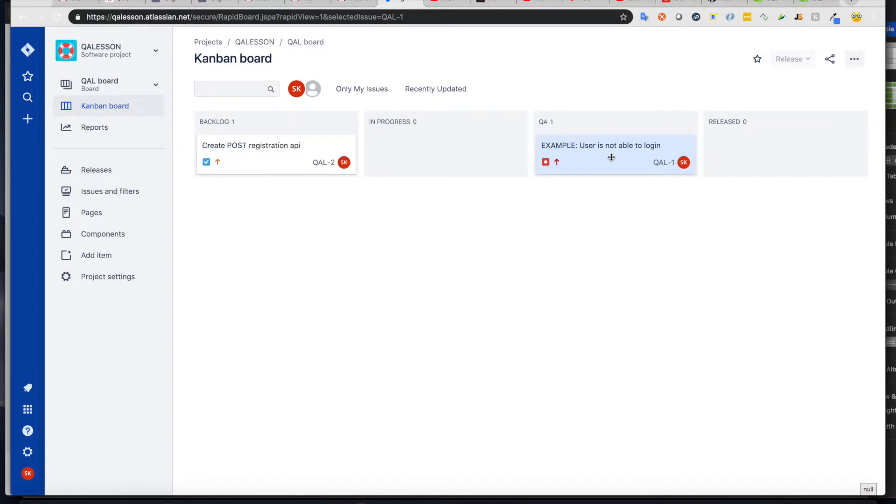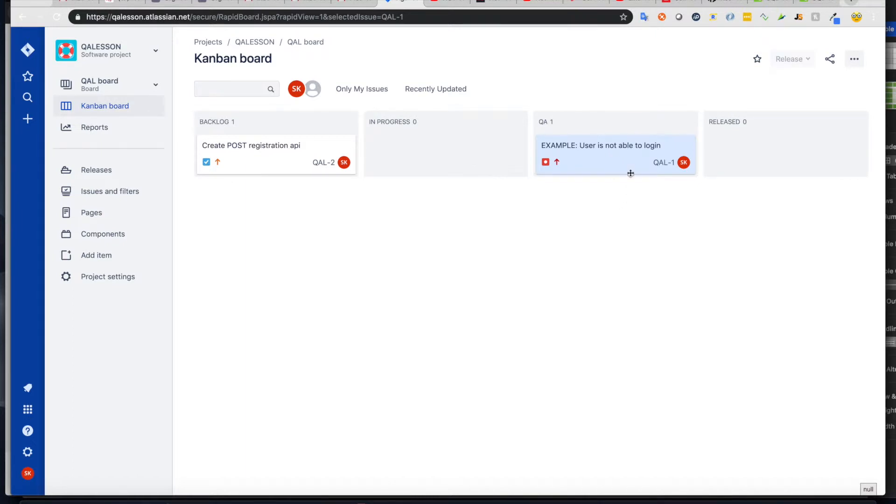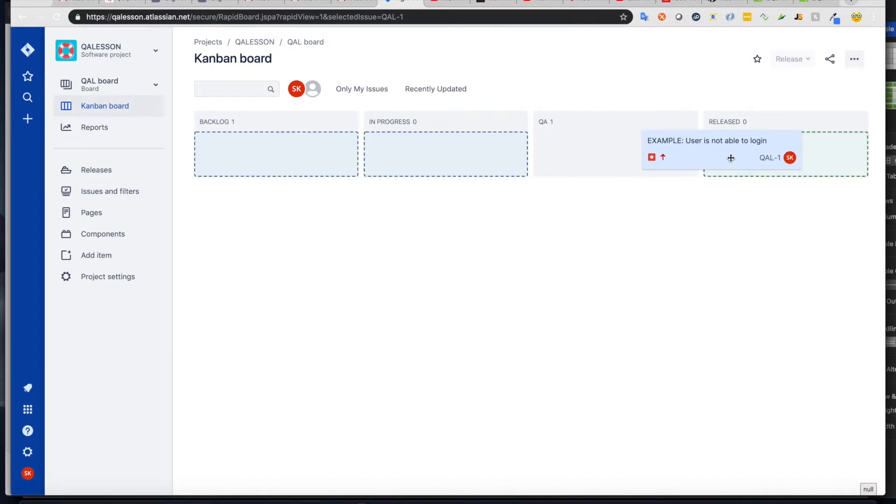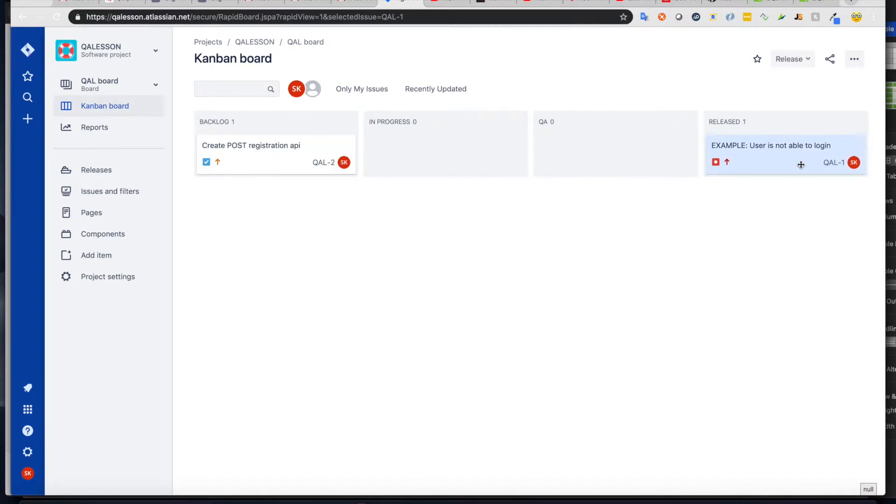he would push it to a QA environment, and also would move the ticket to QA column. And from here, you as the QA engineer would pick it up and then test it. And then whenever you're done testing, and your developer has pushed it to production, you move it to released. That would mean it's already in production, and the bug was fixed.